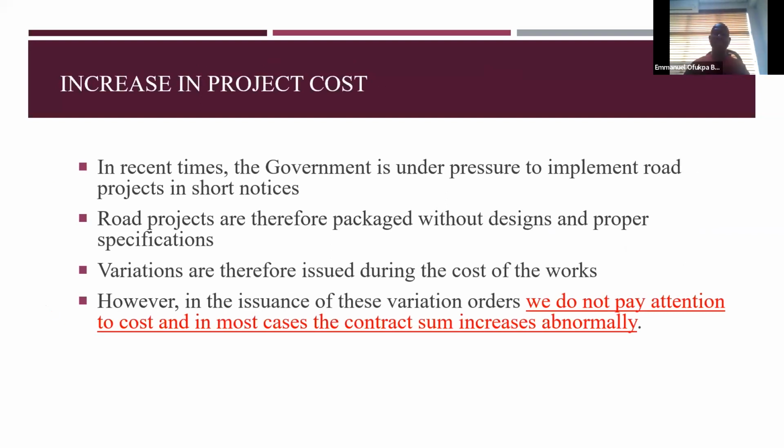In recent times, the government is under pressure to implement road projects on short notice. You see, a lot of pressure is coming from all other places for road infrastructure because the deterioration has become beyond normal. Because of that, road projects are packaged without designs and proper specifications, because we need very short periods to package them. So we don't have the time to do proper studies and then do designs before we can package. So we are able to package using empirical data to do fast tracking.